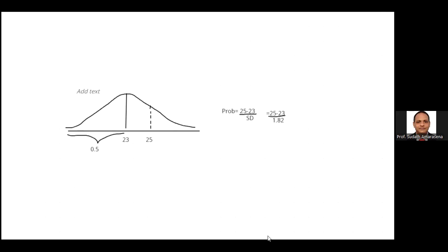Right? There are two types of Z table. One is cumulative, one is non-cumulative. Why I said cumulative: we are going to identify this space value, the more than the 0.5. We need to find the within 25 days. We already know from a starting point to the middle, I mean within 23 days, 0.5. But we don't know in between 23 to 25.